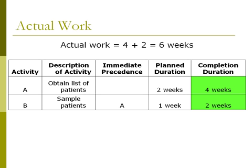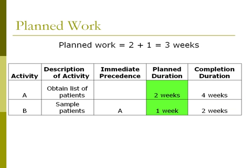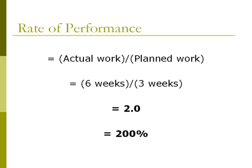For the actual work, we add up the number of weeks for activities A and B in the completed duration column, so it is six weeks. For the planned work, we add up the number of weeks for activities A and B in the planned duration column, which is three weeks. Plugging in those values, we see that the rate of performance is six weeks divided by three weeks, which gives us a rate of performance of 2.0 or 200%.